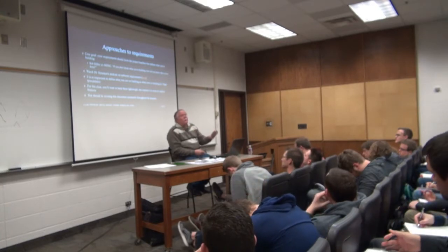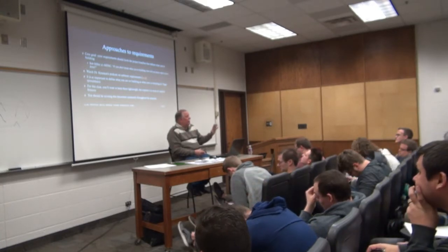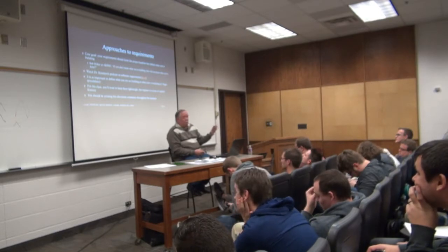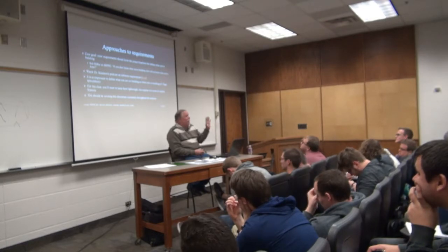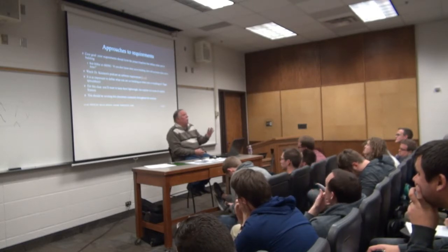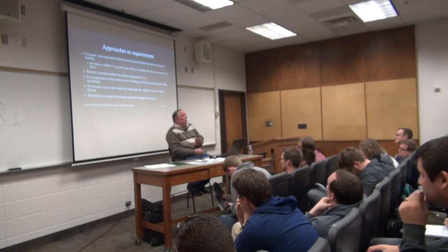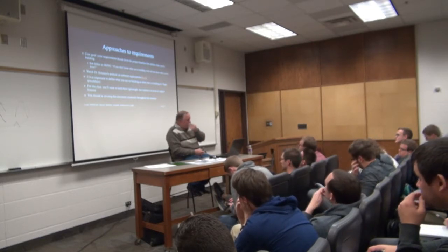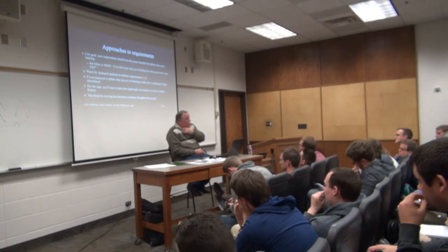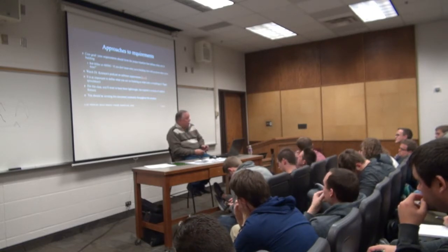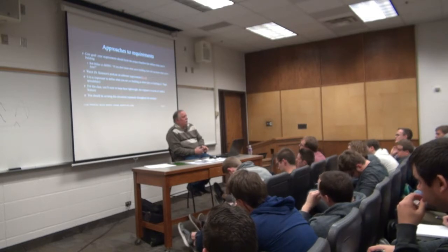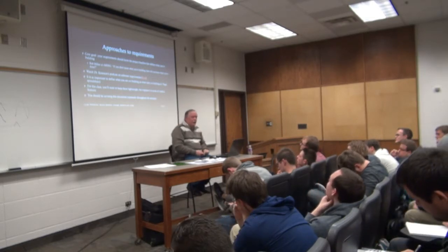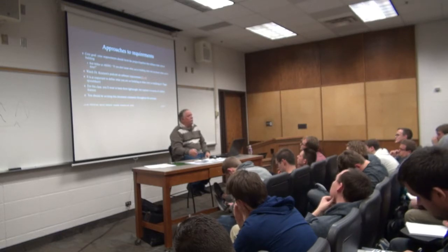So your requirements document at this point is to give you enough of a guideline to define what you're going to build. For some of you, you've got research that you're still doing, investigation. You should try to put down, here are the areas we need to research. This is what we want to find out, if we can do this, or how to do this, or whatever. There's a good podcast on software requirements. I recommend you watch it. It is a good practice to define what you're not building. Not enough groups do this. But it's a good idea to say this application will not do this, will not do this, will not do this.